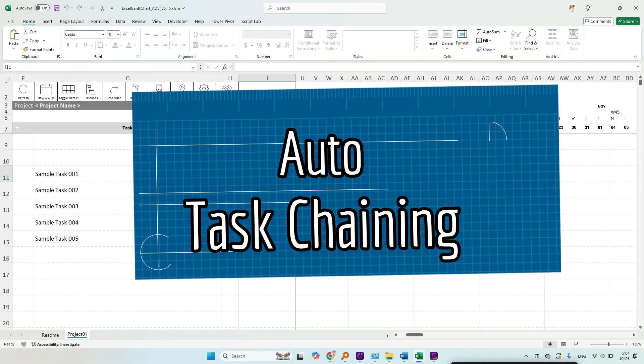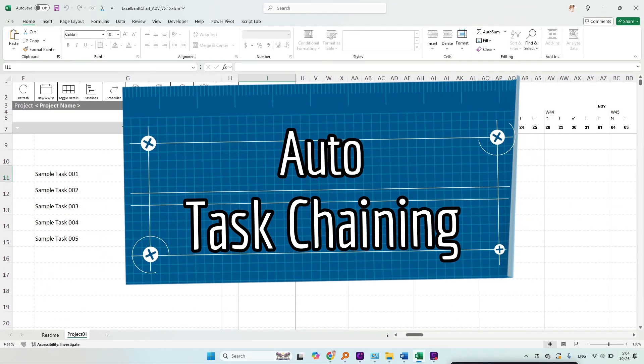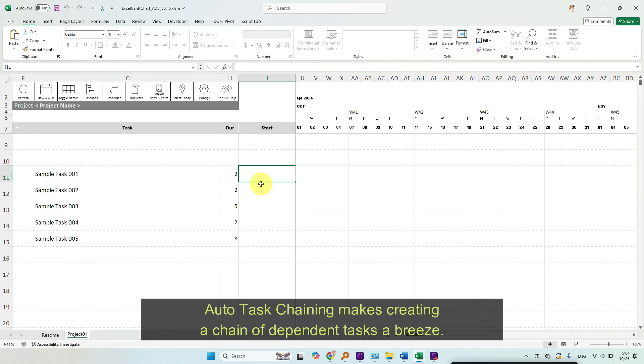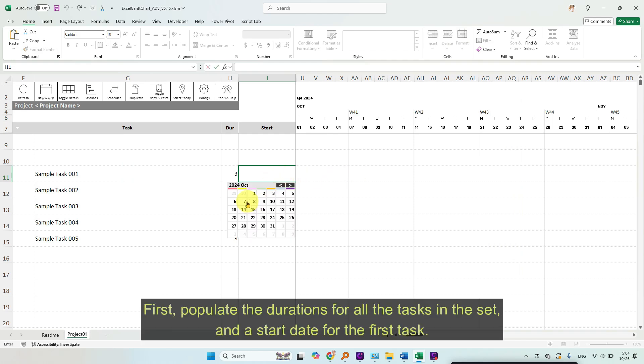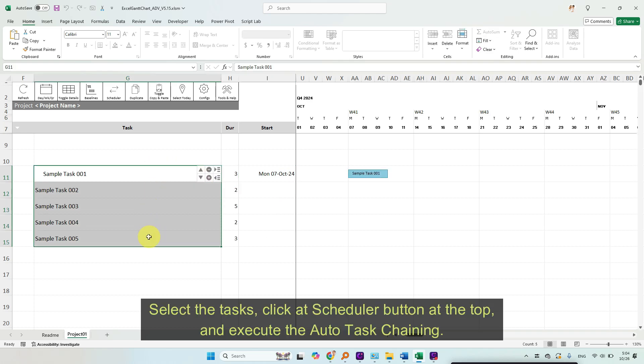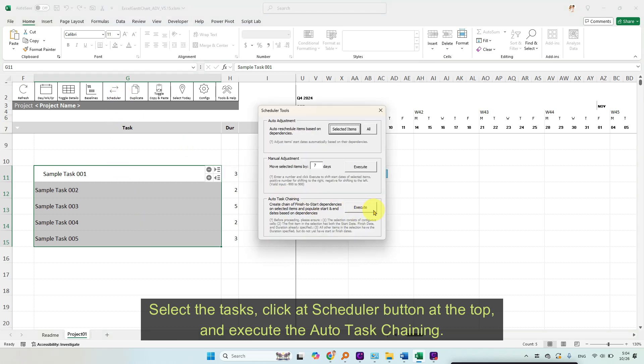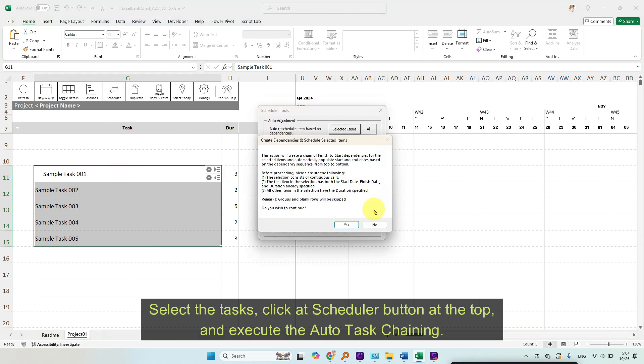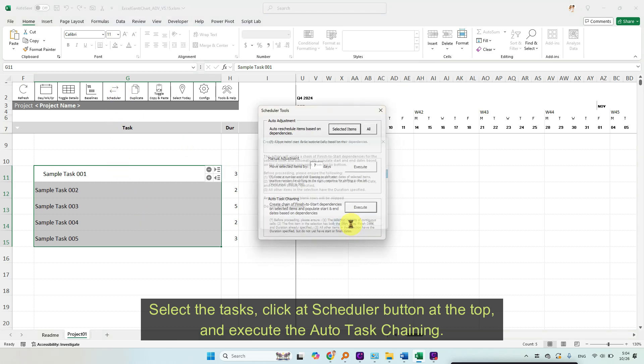Auto task chaining. Auto task chaining makes creating a chain of dependent tasks a breeze. First, populate the durations for all the tasks in the set and a start date for the first task. Select the tasks, click the Scheduler button at the top, and execute the auto task chaining.